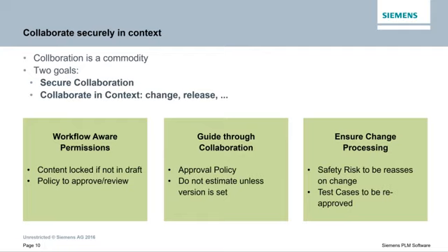Some more principles about how to secure the collaboration. One is really to provide the right guidance. So that's, again, a very great benefit of the workflow engine, which is really an essential part in most of the modern requirements management systems. It allows you not just to control and prevent people from doing some actions, but it also guides them through the right set of actions. The system will guide you that you cannot estimate the story unless the version to which this story should be developed is set. Or it can guide you through the process that before accepting the story for the release, you really have to estimate it. You need to provide the risk analysis.